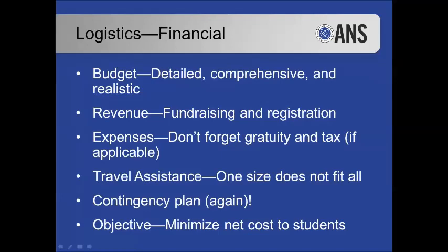And then, as I said, with the technical program and the basic logistics planning, contingency plans: what happens if you don't raise as much money as you think? What are you going to cut first? What are you going to cut second? What can you absolutely not cut that'll make your conference still successful? The overarching goal of the financial portion should be to minimize net cost to students. Professionals are also going to be attending the conference. That's great, but your first priority is always going to be making this conference as accessible to students.